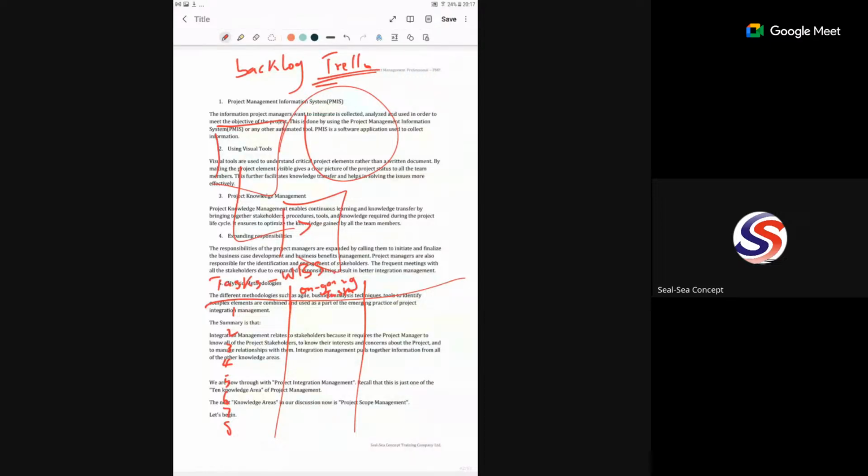So this place will be ongoing task. It is from here we can say we take task 1, maybe we take task 2. Tasks under the ongoing column must not be more than 3, so that you are not having too much at hand.